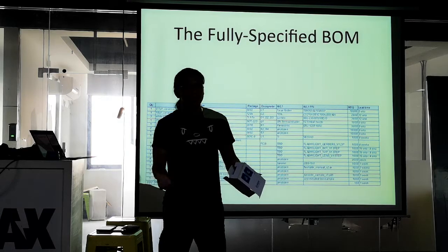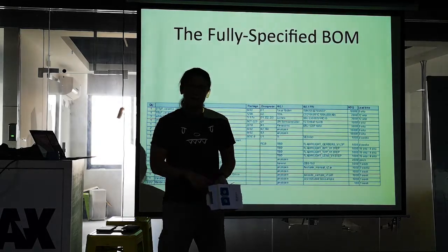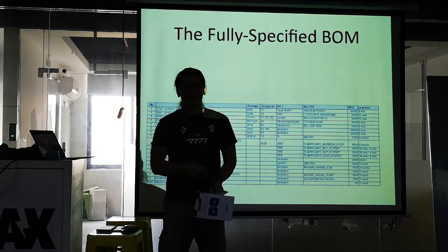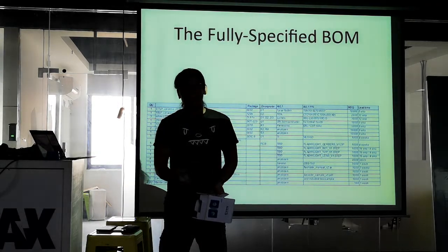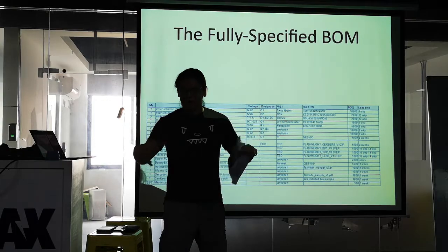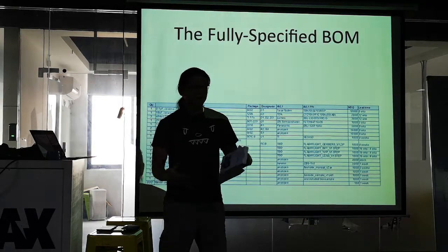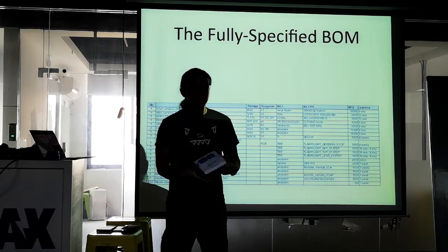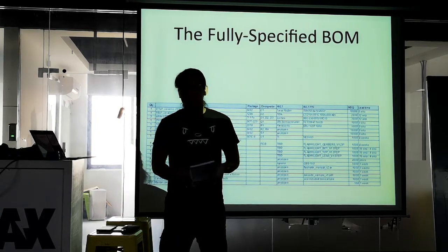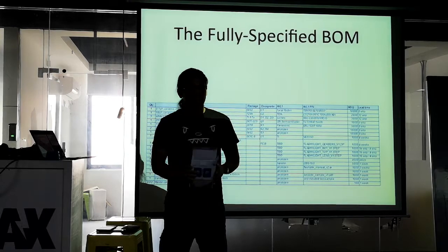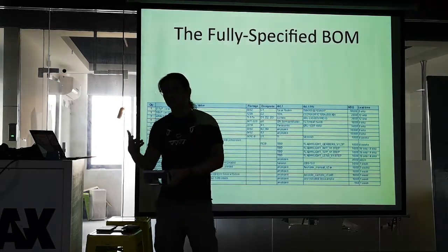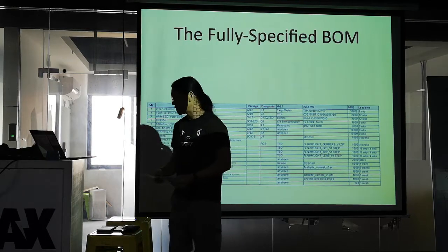You didn't specify. So I had finished product, done on time. Then I had to wait 2 weeks for those master cartons to get built because I didn't tell them ahead of time I wanted this brown box to put these things in. And this was a startup, and we needed to monetize this inventory, and the invoice is moving, that sort of stuff. So it was not a great outcome. So you need to think about every single little bit and part if you're going into production, what should go into the bill of materials.